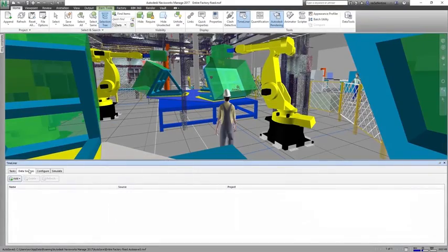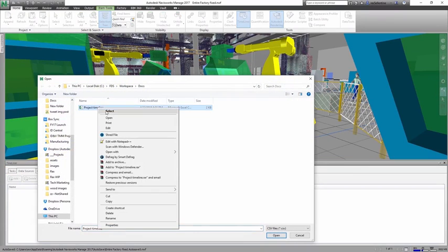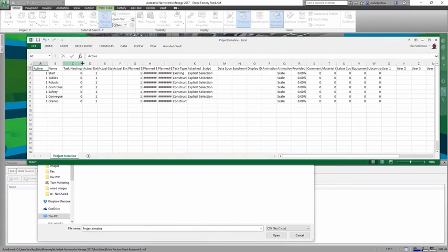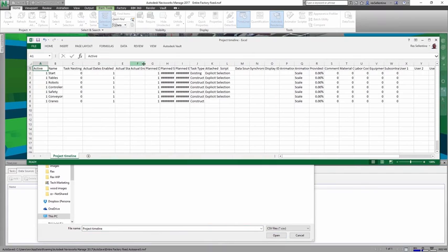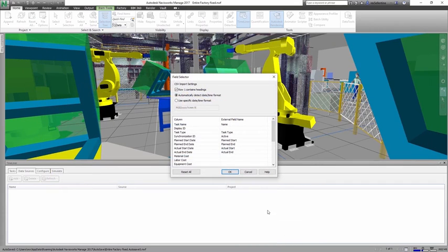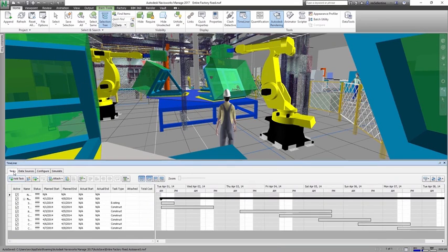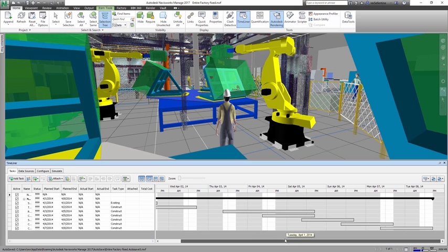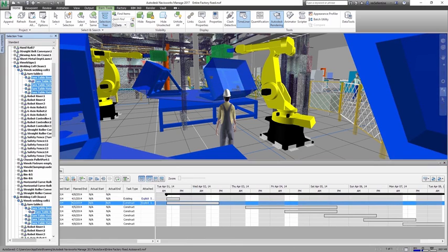Now that the factory equipment is planned out, we begin the install and commissioning process for the new factory layout. With the planning tool, we can manually add the items, but we found that many organizations want to open up the install planning to a larger team. Thus, tools like Microsoft Project, or in our case Excel, can be used to develop the install plan. Our plan is to install the tables, followed by the robots, controller, safety equipment, conveyor, and finally the cranes.